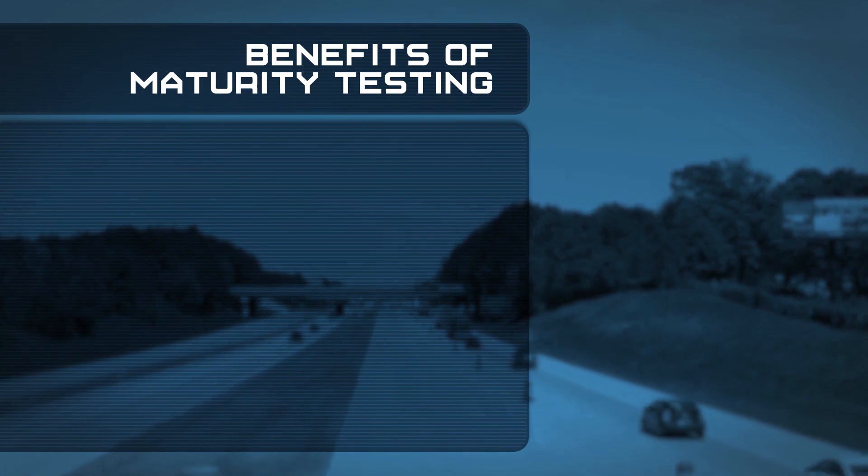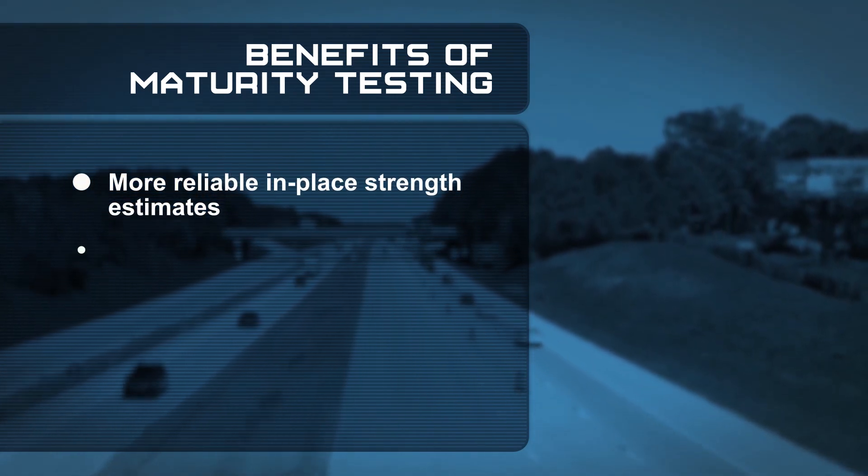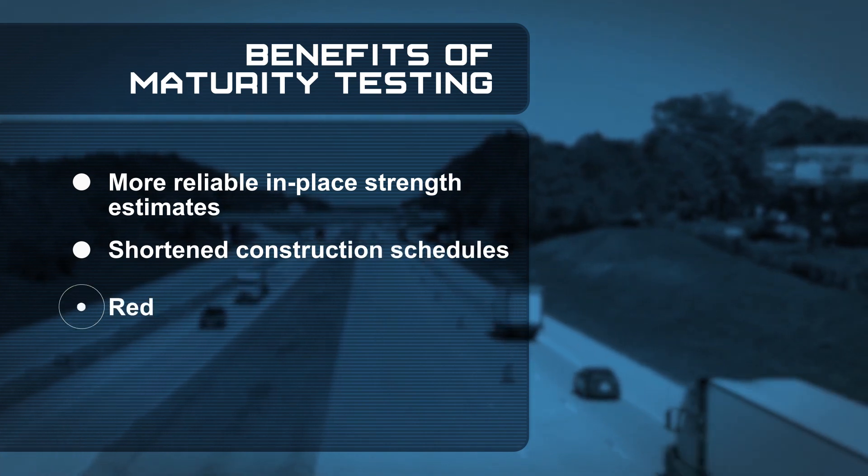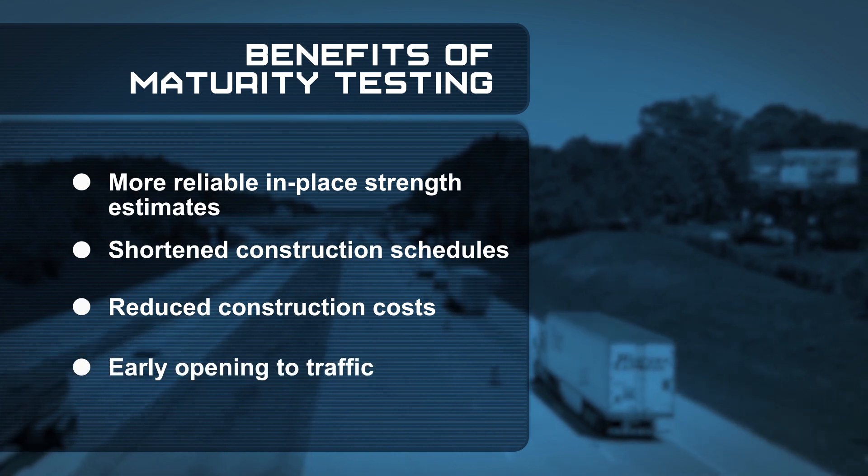Benefits of using maturity testing include more reliable in-place strength estimates, shortened construction schedules, reduced construction costs, and early opening to traffic. With maturity, what we're really gaining is time, and with time we're gaining less effort and more money saved.